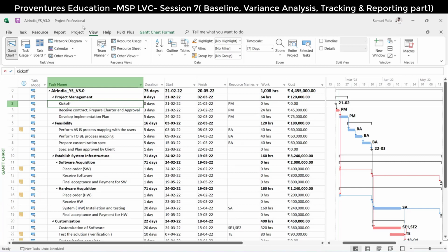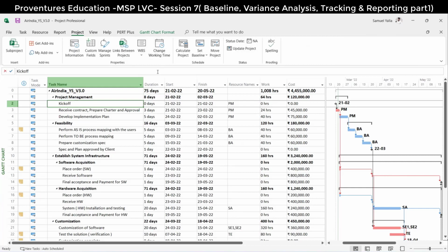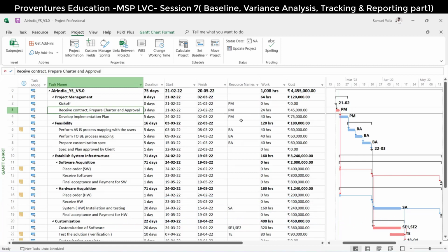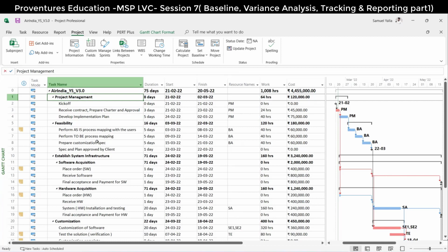So that is why we will set the calendar for the project initially. We will set it, and after that, every activity that you create, every resource you create, will automatically follow the project timeline only. Any change apart from the project timeline, then we will update it in the individual resource calendar. Okay, now tell me, any questions so far?